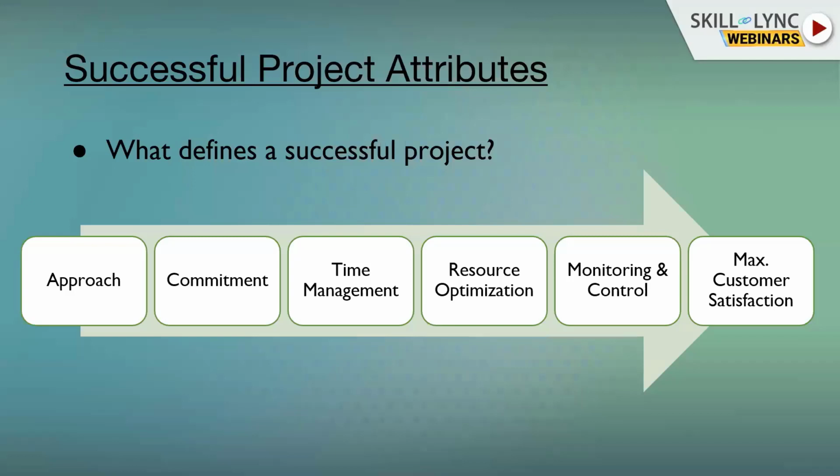It goes from initiation to the closing of the project. And maybe after that also, because there is delay analysis, and there is a defect liability period after the project gets closed. During the DLP, the defect liability period, quality control also happens. So monitoring and control is an activity which starts from the initiation phase and continues until the closing phase. This is a very major activity and it has a very vital role in successful project completion.